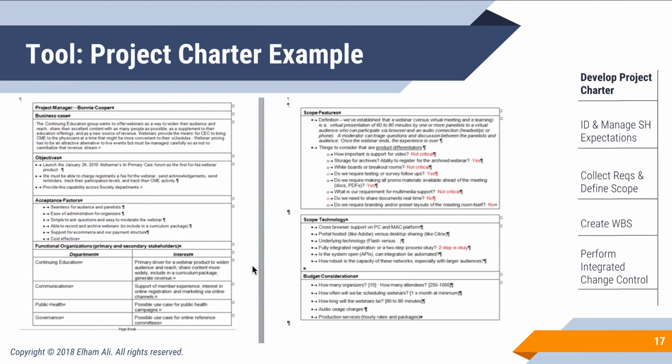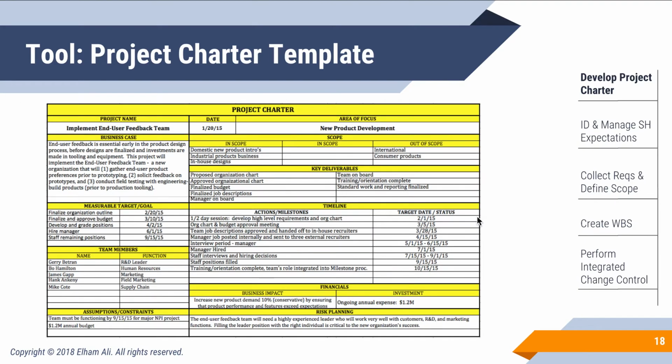And so when I identify my stakeholders and I get a sense of boundaries from the first questions that I ask with my customers and project sponsors, I start off with a specific project charter, and this is also from Bonnie too, which is a template that I've also used and found extremely helpful. And it tells you an idea early on in the project about what acceptance is. It gives me an idea of success, and who I'm working with from the functional organization, and what is the basic functions as a scope if it has been already differentiated from the market, and what kind of requirements do I need to start thinking of early on. This is another template that I've used and found it pretty interesting.